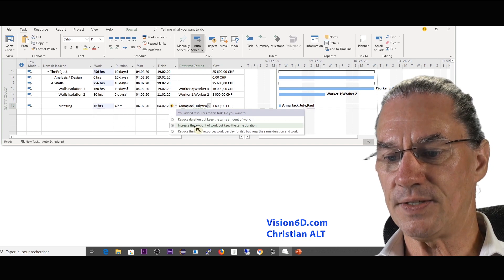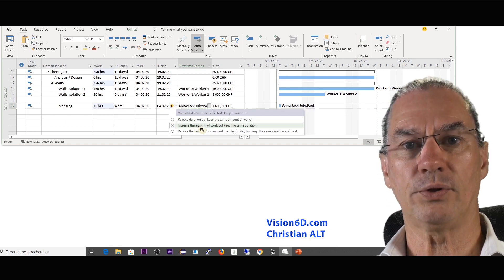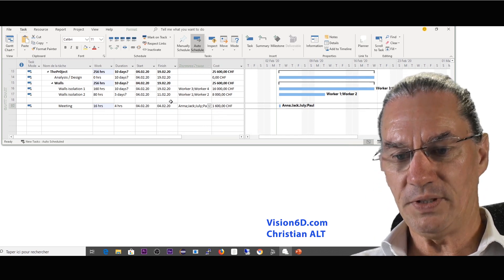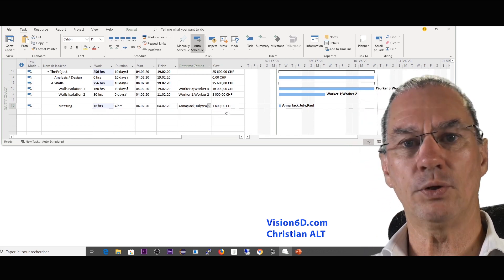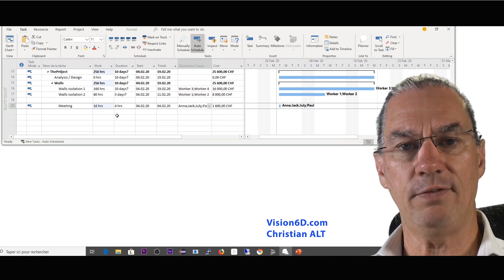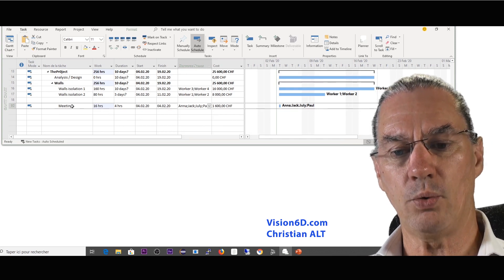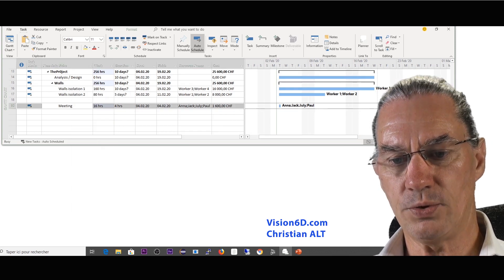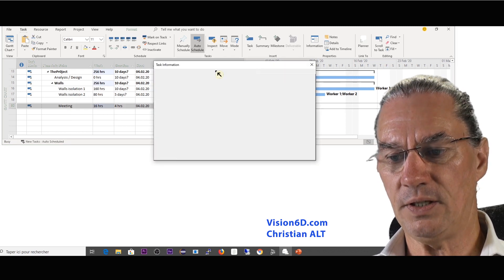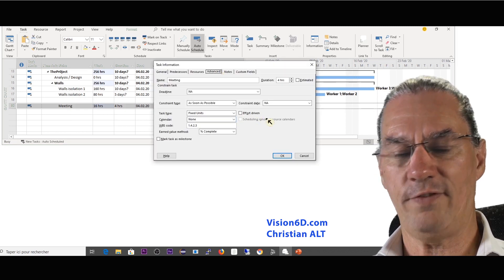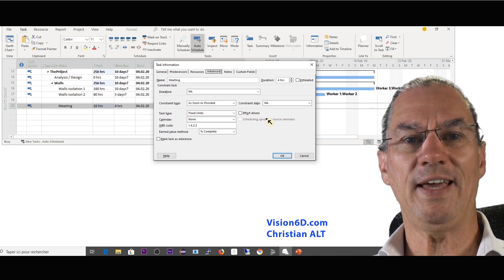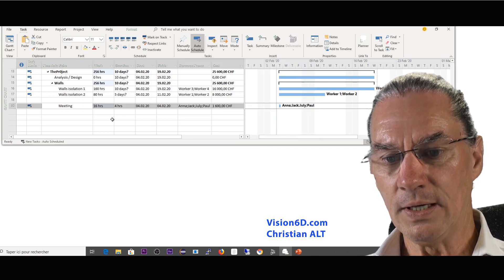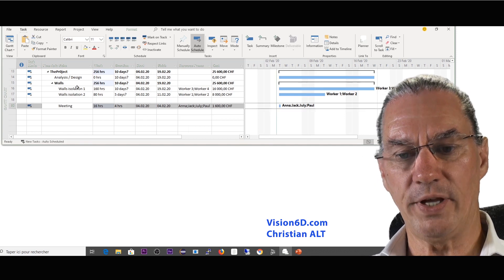So I say here increase the amount of work. It's really what we want. So this is a different behavior with the costs and this is the default behavior and it corresponds really well. I'm just going to check again to make you see that the meeting here is really defined with no effort driven. The checkbox isn't marked. This is the correct way to do this.